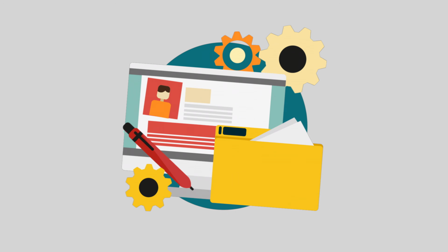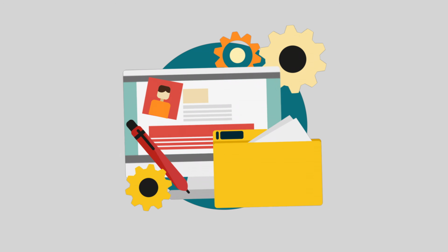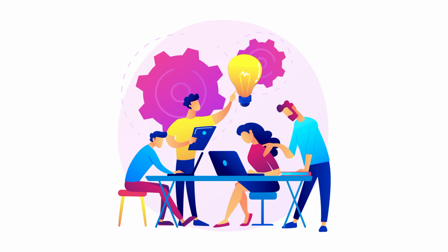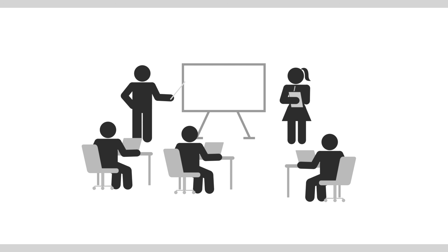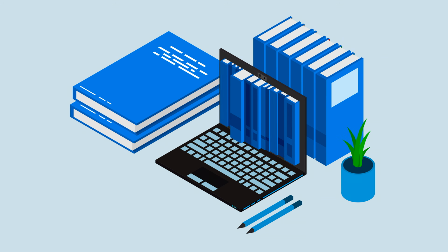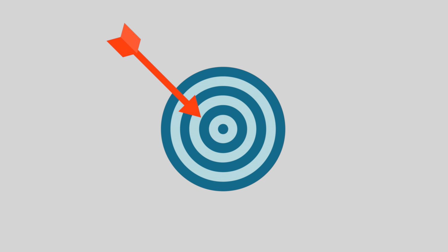Let's imagine a university is launching a new faculty onboarding initiative. The project team may initially describe the goal as improving the onboarding experience. That's an important objective, but it's not a deliverable. As the team plans the project, they might identify deliverables such as a faculty onboarding website, a new orientation program, onboarding checklists, training materials for department chairs, and a faculty resource guide. Notice how these deliverables make the work much more concrete. They provide a clear picture of what the project will produce and help define the scope of the project.